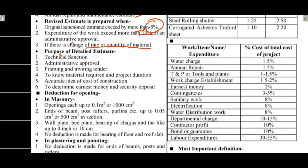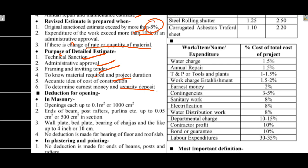Detail estimate purposes include technical section, administrative approval, framing and inviting tender to know the material required and project duration, accurate idea of the cost and duration to determine earnest money and security deposit.